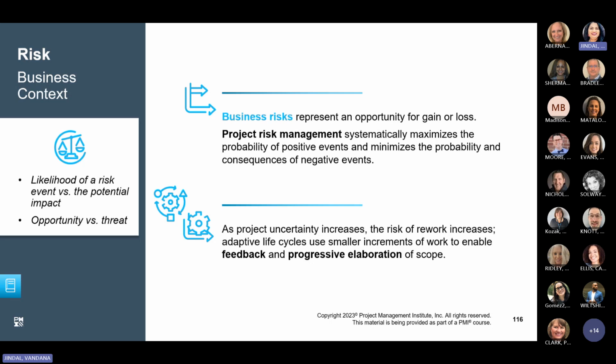And those risks are handled in different ways in different project planning approaches, like predictive project planning, which I'm sure you have all read about, and adaptive project planning. In predictive project planning, the risks are often identified, assessed, and planned upfront. The project is viewed as a linear sequence of events, and changes are not expected to happen very frequently. Therefore, a detailed risk management plan is created at the beginning of the project, with risk monitoring and control processes. Whereas in adaptive project planning, the risk handling is different because it is associated with agile methodologies, where they embrace change and uncertainties.